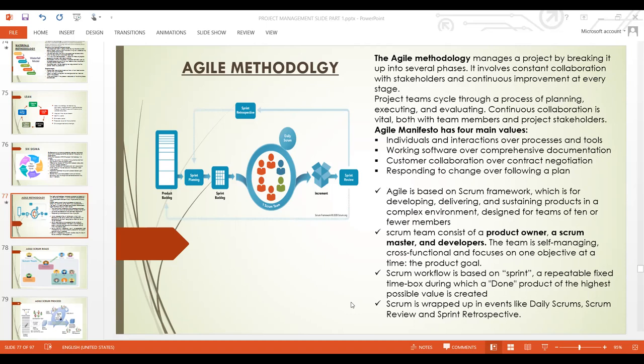And after this Scrum Review, where you have demonstrated what you've done and then deployed the feature, the next thing is to go back and pick another feature through a sprint and start developing it. But before you pick another feature to develop, the Scrum team must observe what we call sprint retrospective, where the whole team gathers to look at what has been going on within the 1 month we have been working together. How can we improve as a team? Where do we need to improve? After the meeting, you tidy your house up, and then you go back and start another sprint.